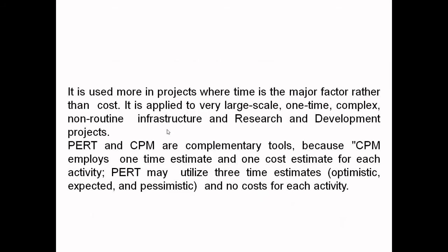So it is used in projects where time is a major factor rather than the cost. It is applied to very large scale, one-time, complex, non-routine infrastructure and research and development projects. Sir, please note it down. This is also used more in projects where time is a major factor rather than the cost. I need to complete my task within a specified time. Within a specified time, I would like to complete my work. But for me, the cost is not important, right?